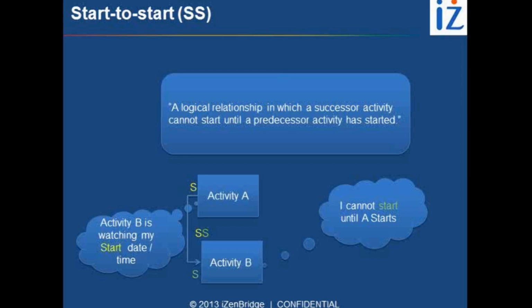So if you are looking at two activities only, you end up thinking that, okay, it looks like these two activities will start in parallel. Not necessary. The rule is saying that activity B cannot start before A, but it does not say that activities A and B have to start together. So keep that in mind, especially when you do a backward pass, when you calculate the late start, you may have a different late start than the start of activity A.